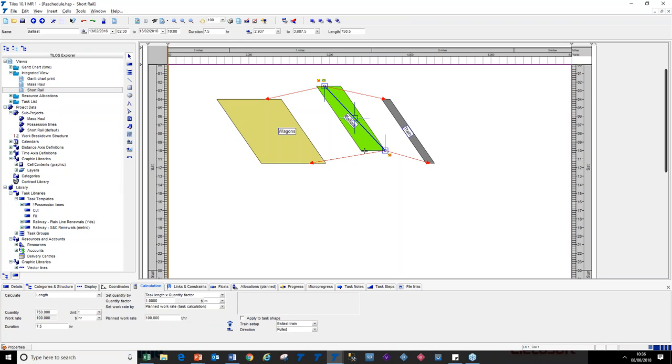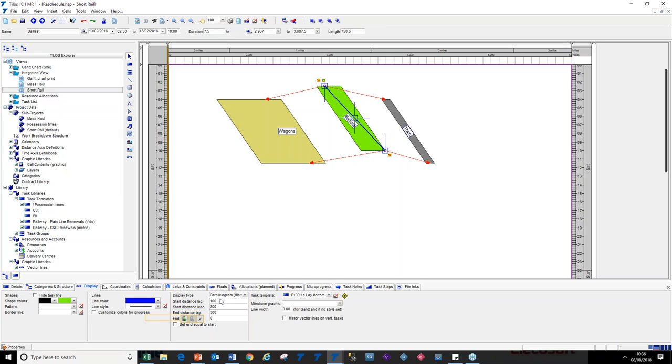I've got a ballast laying machine, and that's driving the process, because it has a certain quantity of material and a certain rate at which it can be laid, and it's got a certain footprint. The configuration of this is that it's got a certain amount of lag before the active line and after it, which represents the physical nature of that machine.